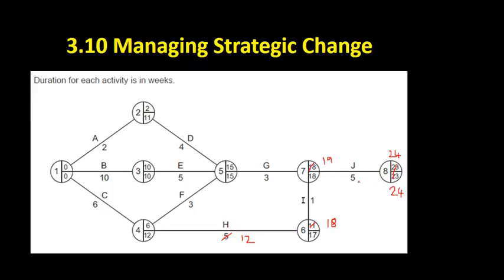And let's work backwards and see what's happened to the critical path. So we start again at 24. The latest finish time for activities G and I. If we're going to finish on 24 weeks, activity J takes five weeks to do. So that's going to be 19.